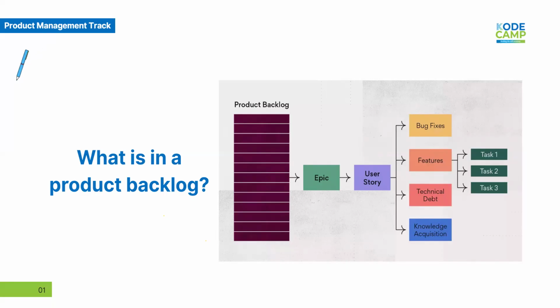That's when you add knowledge acquisition tasks to the backlog. These are your research stories, your spikes. They are called learn-before-you-build stories. For example, research API providers for facial recognition authentication. You have to do that research.